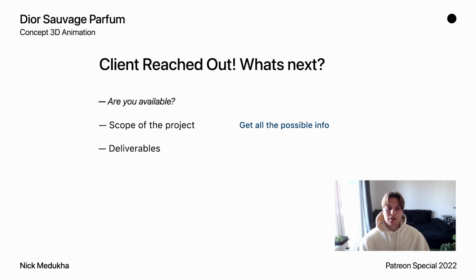The second question is often about the deliverables. If deliverables include animation, a good idea would be to ask about resolution, codec, bitrate, etc. If it's a still frame, you still need to know the resolution and file format. In our case, the main film will be around 15 to 20 seconds long, 3D animation, Full HD 1920 by 1080, MP4 codec, and 20 bits.